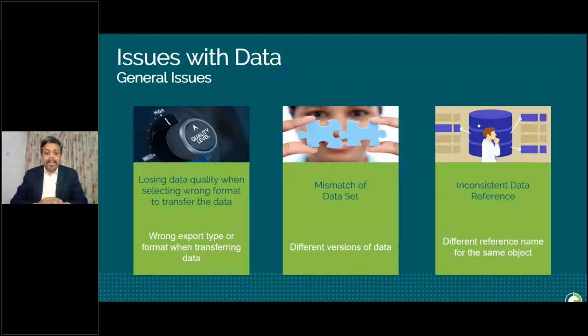An isometric name has a separator between the project area and the isometric number. The separator character was agreed. It was a mega project and more than one company was involved in the piping discipline. Even though the separator character was agreed and documented, different companies used different separators, and some companies even stored the area name in a separate column. This was identified in the later stage of the project.